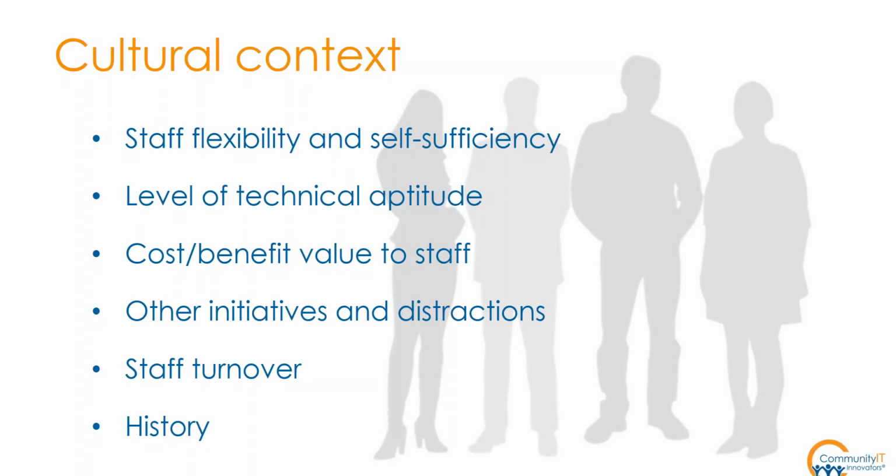Be very aware of other initiatives and distractions. Don't plan major IT projects right before the annual conference. When you're trying to launch a new program, you need to be aware of that, unless you're launching a new system to support the new program, then you want to make sure that you've timed that well also. So I think it's important to just be aware, in the same way that we talked about with regards to the leaders of the organization. Staff have a certain amount of time and energy that you need to be aware of and can't overtax.